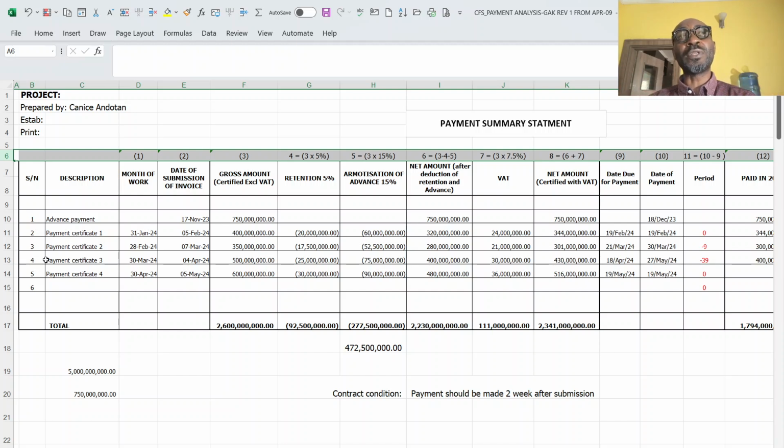Then it is upon those rates that the central bank knocks off the two highest and averages the remaining ones, and that average of the remaining interest rates from other banks becomes a reference point to be applied in such instance. But the condition will not just stipulate that that rate should be.